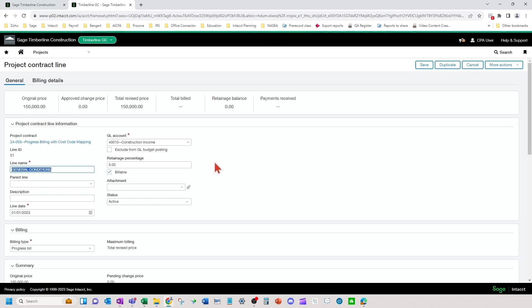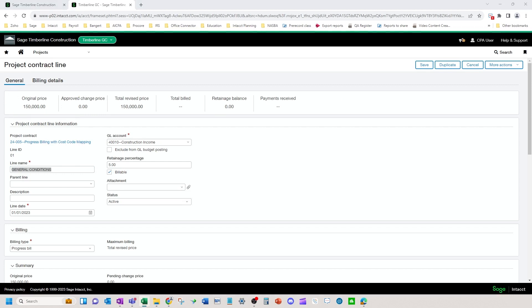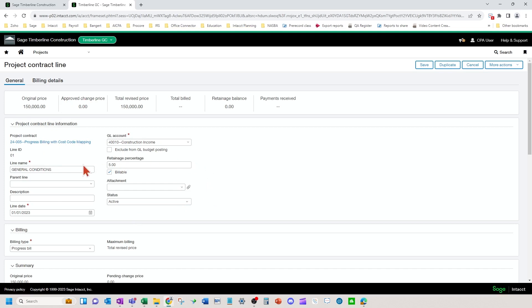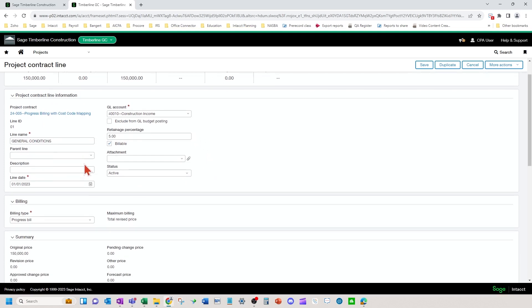So first of all, for progress billing, an AIA type setup, there is no cost code linking. So to get to the report that I showed, we have to do a couple of things for setup on the cost codes and on the contract lines. So you're going to set up your contract and your lines, just like you would a normal AIA setup. You're going to have progress bill down here.